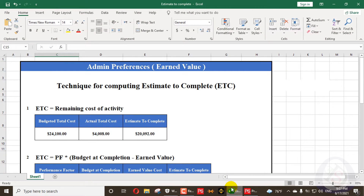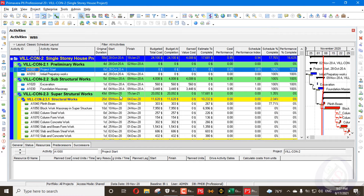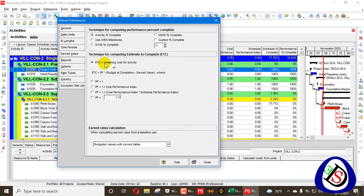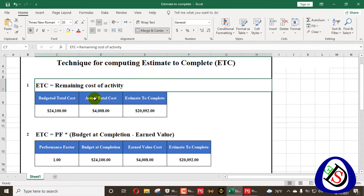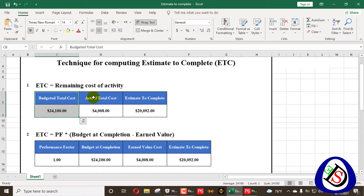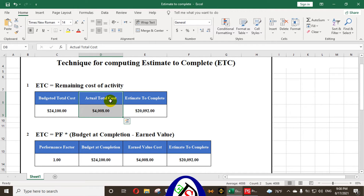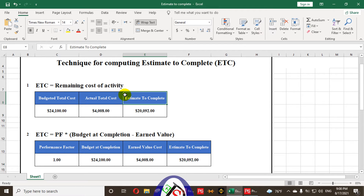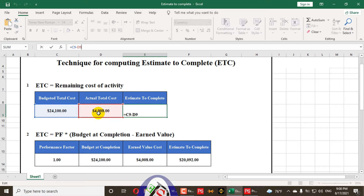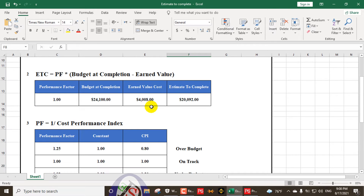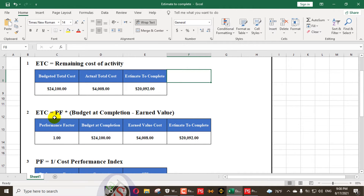I have created an Excel sheet to explain all of this. The first option in Admin Preferences is ETC equal to Remaining Cost for Activity. The formula is: Budgeted Total Cost minus Actual Total Cost equals Estimate to Complete. In the spreadsheet, this is represented as cell C9 minus D9 — budgeted total cost minus actual total cost gives you your Estimate to Complete.